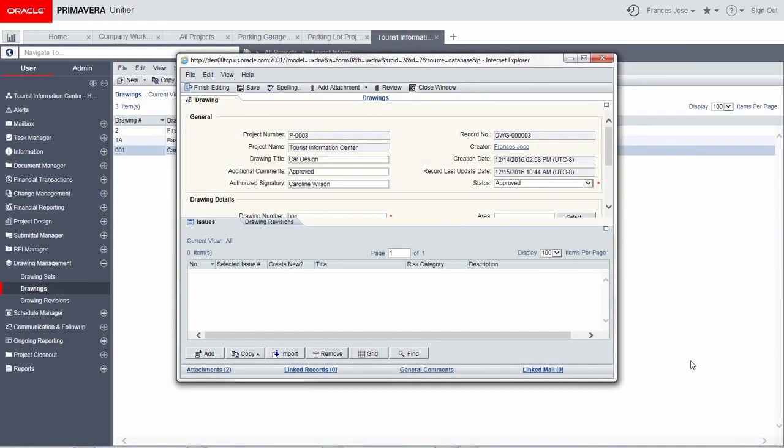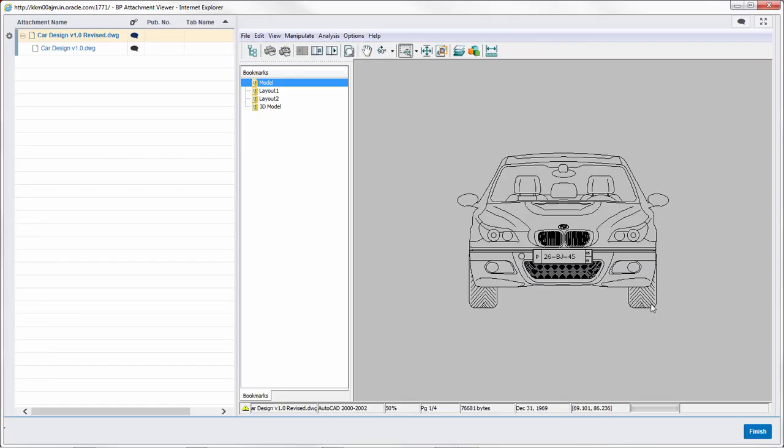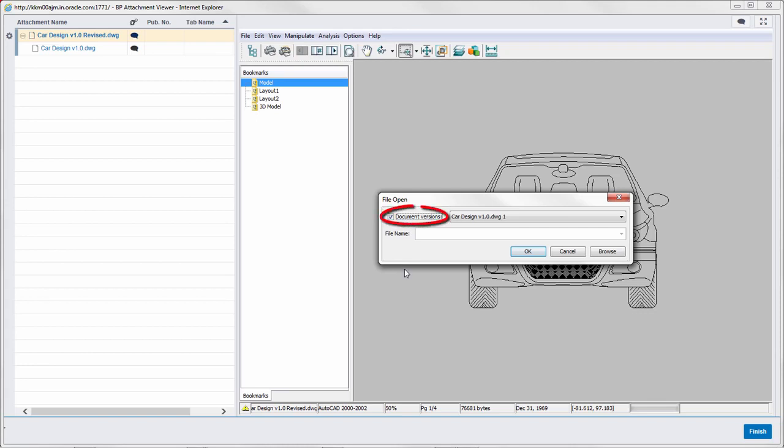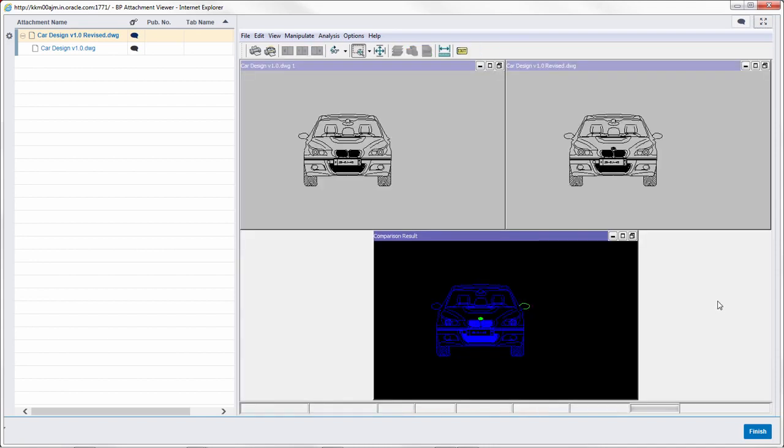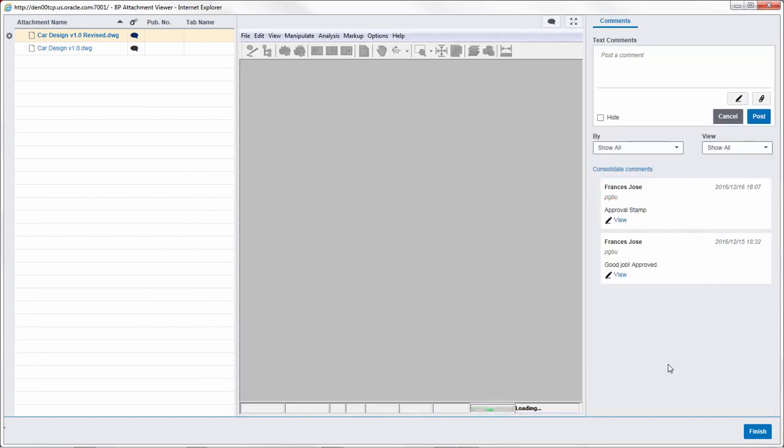Unifier also allows you to compare two versions of a vector document, which can be business process attachments or documents in the document manager. Open a business process form to view its attachments. The left attachments panel displays the two versions of a design. Next we will compare the two versions and see the result. Clear the document versions checkbox if you want to compare with a version saved on your local system. The two versions are displayed side by side. The drawing in the comparison results section highlights the changes.